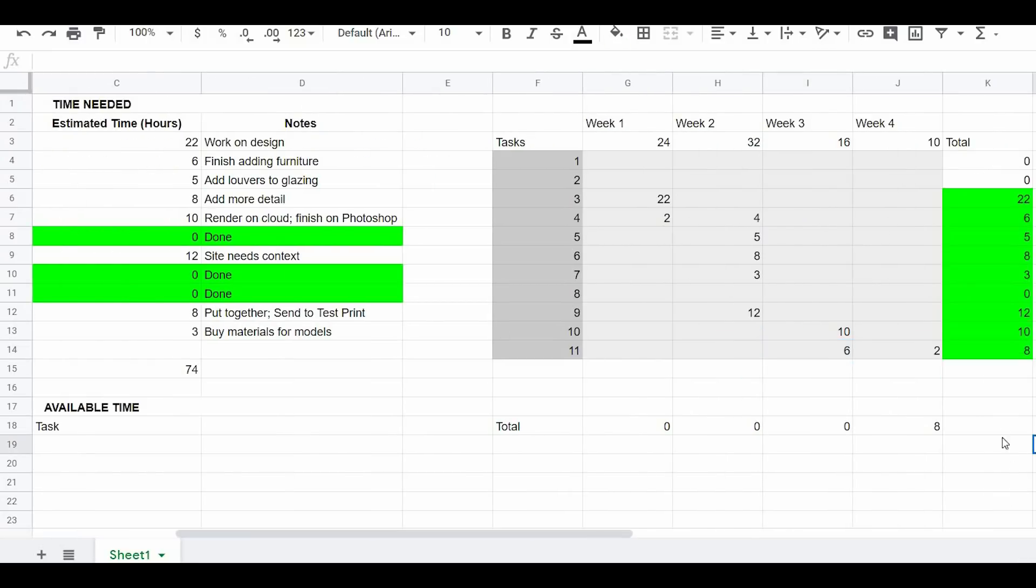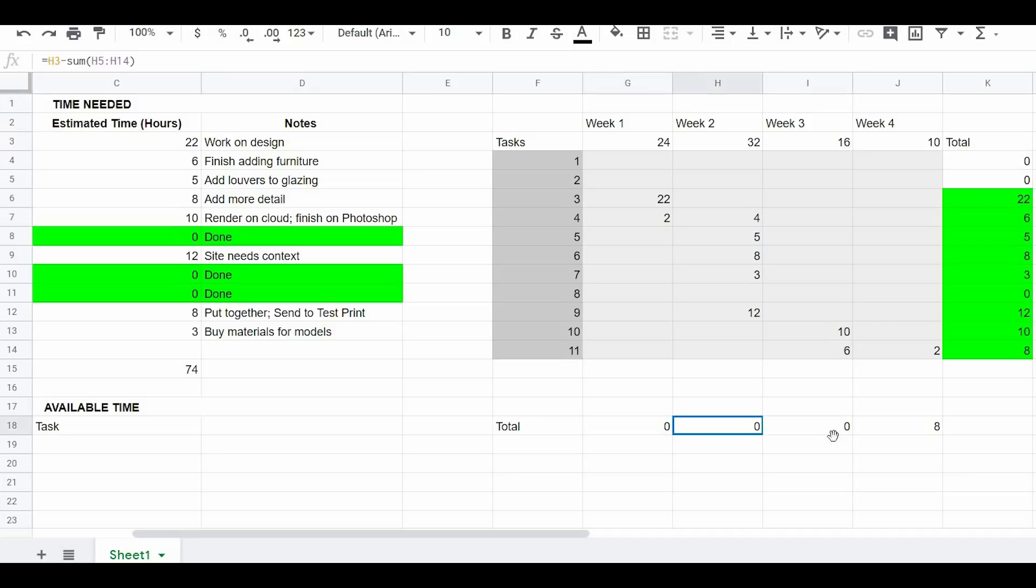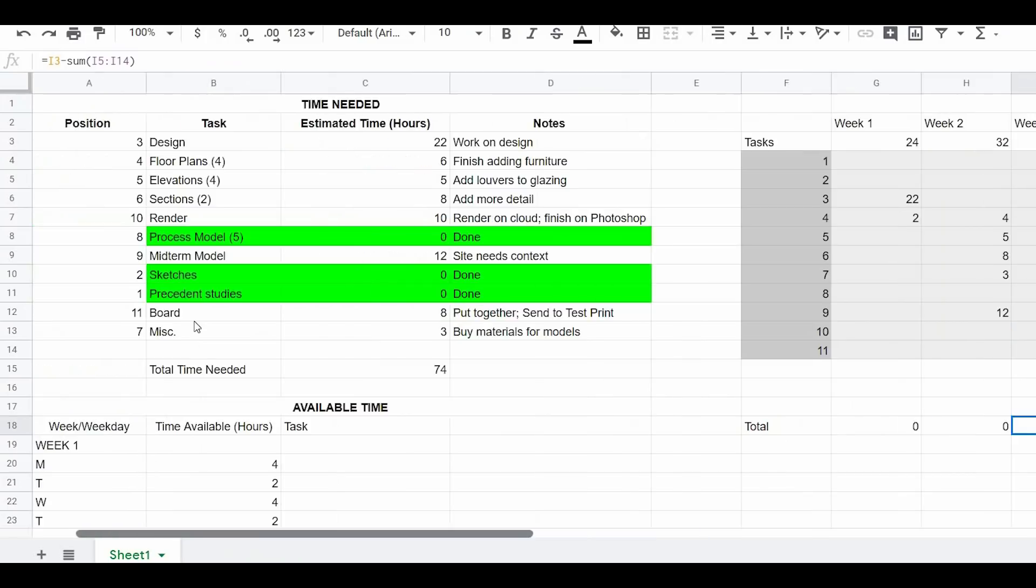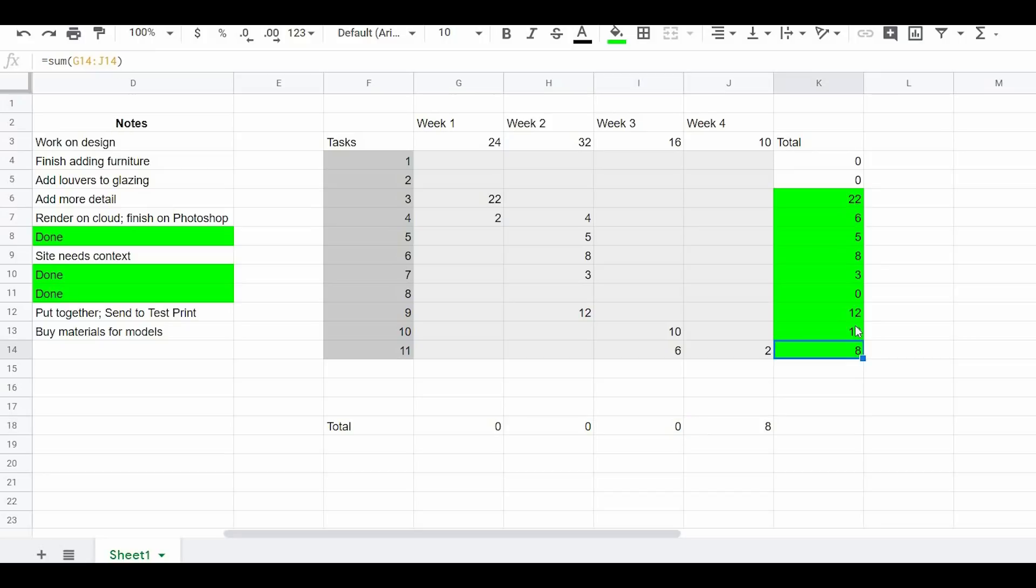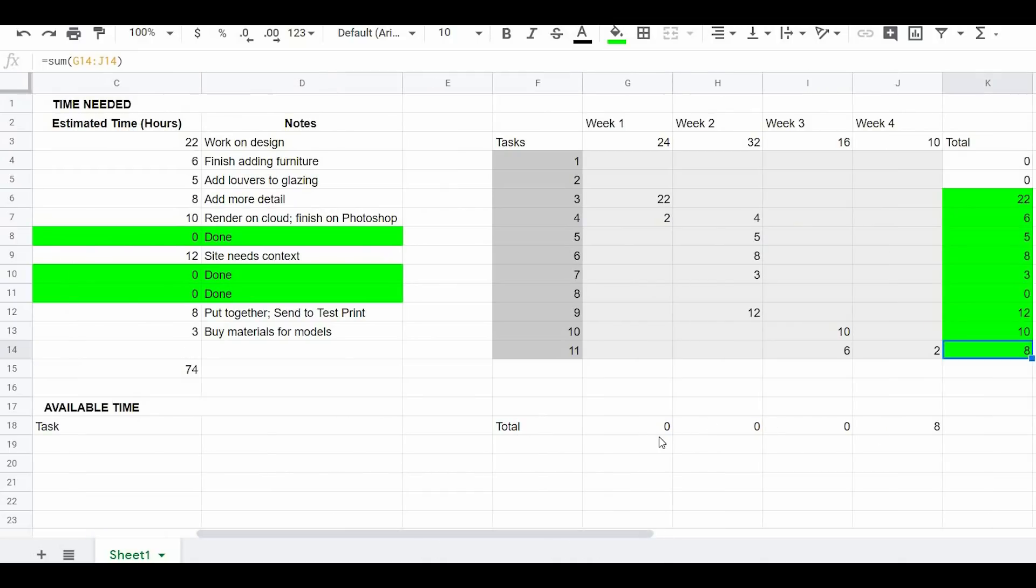So now I've gone ahead and completed this step. These are the tasks that need to get done and how long each of them are going to take. You're going to notice that I never went negative. You never want this to be negative. You always want this to be at zero because that means you're using up the amount of available time you have that week. And the second thing I wanted to make sure is that my steps are adding up too. So you want to make sure that all these numbers equal all these numbers, and you want to make sure that these numbers here equals zero.